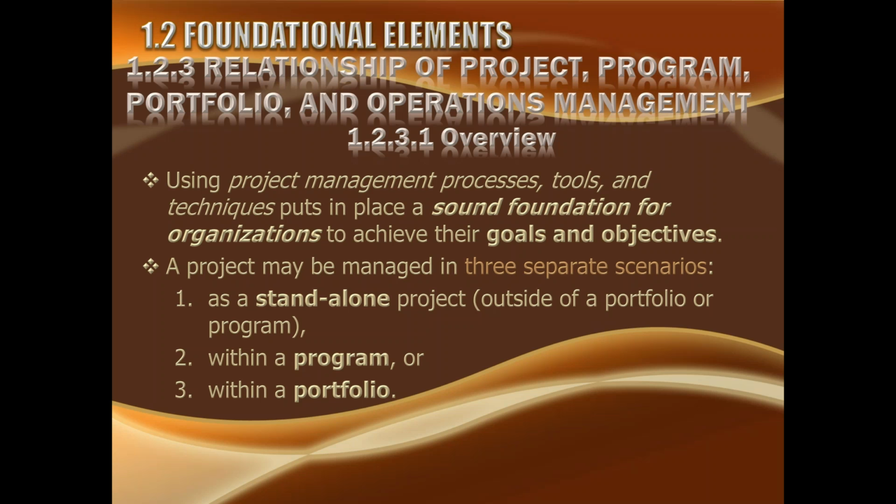But what I mean to say is the project is focused on delivering the deliverable, which will ultimately be yielding the benefit or the outcome. But from the perspective of the project manager, as soon as the deliverable is accepted, the project has done its job. Now it is someone else's job to monitor the benefits and the outcome. That is the basic story.